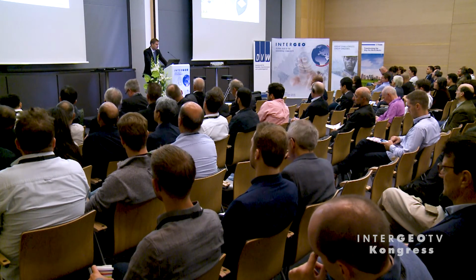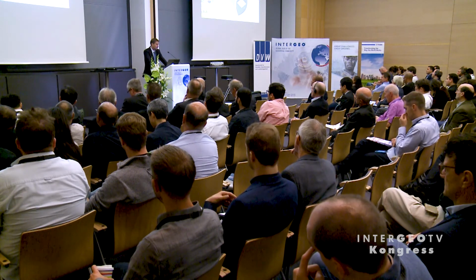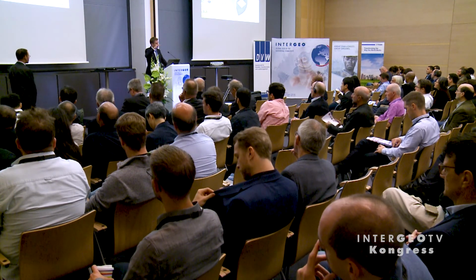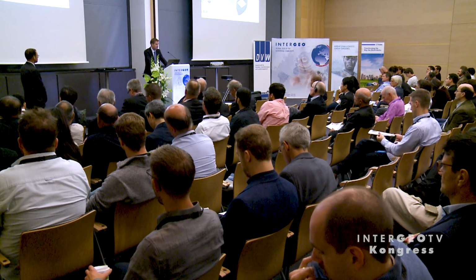To move forward in Germany, especially, or in Europe, you can say, it will be necessary to change a little bit the rules and the laws to define or to give projects to the industry. So we see a big break between design and construction from the BIM approach perspective. The Nordic countries are a little bit further here. The problem is that up to the design, you have the benefits, then you just transfer the data to the construction company and they start again with this. So we have no collaboration between the design and the construction, but this is due to the tendering process. So it's interesting times coming up, and I can only motivate everybody to get involved in this. It's a very interesting